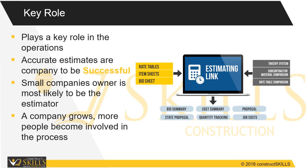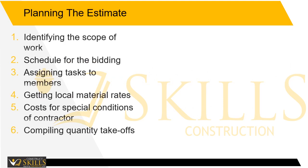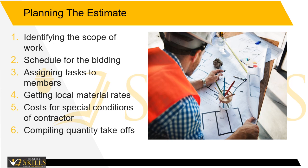As a company grows, more people become involved in the process, and this additional complexity and reduced accountability increases risk — proper approvals need to be in place to compile a quote. Planning the estimate consists of identifying the scope of work for the project, preparing a schedule for the bidding process, and assigning tasks to members of the estimating team.